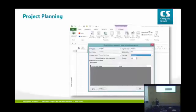All right, so the very first thing you do in Microsoft Project is set the project start date. Okay, the reason I'm saying this like this, it seems pretty simple, but the first thing that most people do, if they haven't been told, is go into Microsoft Project and set the start date of the first task in the project. So does anybody know what that will do? Anyone? Big brains? The baseline date? Almost. Good try. It'll actually put a constraint on that date.